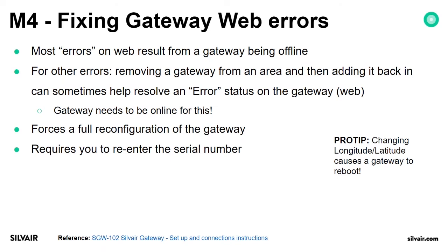Very important, very often missed thing is that changing longitude and latitude causes a gateway to reboot. And if such a change should be made and the gateway is offline, this would also cause some errors.